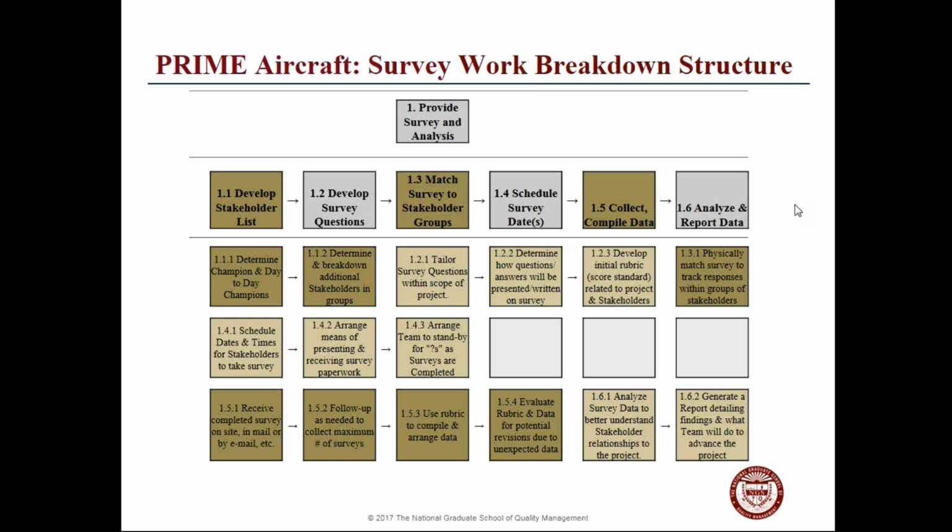Okay, this is our aircraft survey work breakdown structure. In order to provide a survey and an analysis: develop a stakeholders list, survey questions, match survey to stakeholder groups, schedule survey dates, collect data and compile data, analyze and report the data. Okay, we've yet to determine.